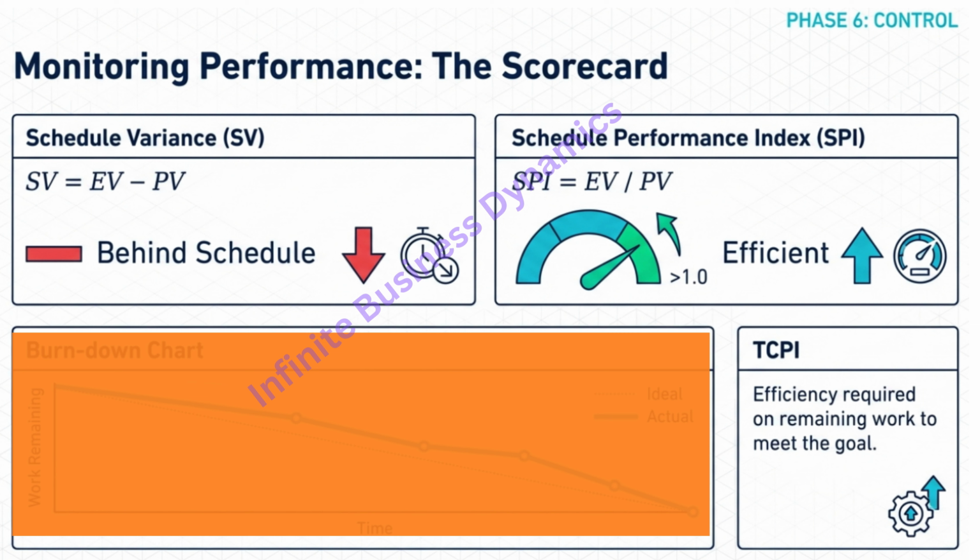And to visualize this, the notes mention burn-down charts and trend analysis. Burn-down charts are great for agile teams, showing work remaining versus time. But trend analysis is the crystal ball. It uses that historical SPI. It says you've been 10% late every week for 2 months. The math says you will likely be 10% late next week too. It cuts through the optimism and shows you the likely trajectory.